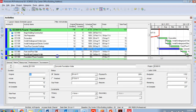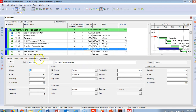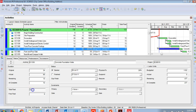After understanding the activity in the General tab, go to the Status tab. In the Status tab you'll find the activity ID, name, original duration, actual duration, remaining duration, at completion, total float, and free float. For example, this activity shows at completion as 70 days but the original is 24 — meaning it's delayed. Free float means the activity can be delayed without delaying successors; total float means a delay will affect the project completion date and the critical path.